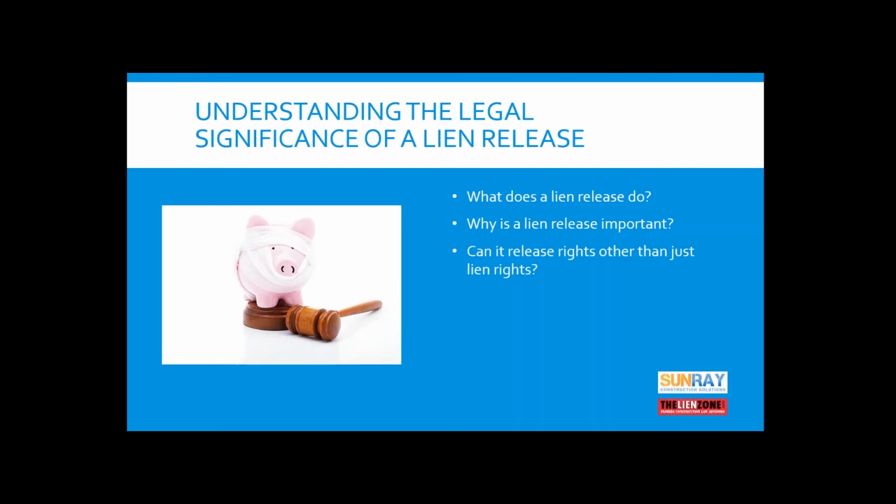So as I alluded to, while in construction almost every release is called a lien release or a lien waiver, depending on the language of the document, you may be releasing rights far in excess of just your lien rights. So if you've seen or had to sign one of those releases that is the better part of a page, lots of fine print, you're probably releasing rights far in excess of your lien rights. It probably says that you're releasing any claims for change orders, delays, impacts, costs.